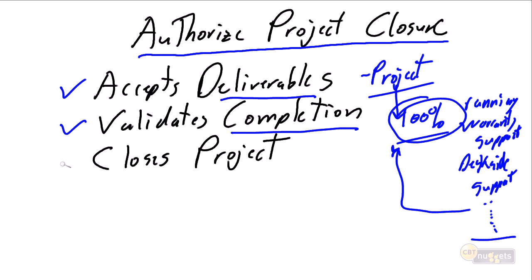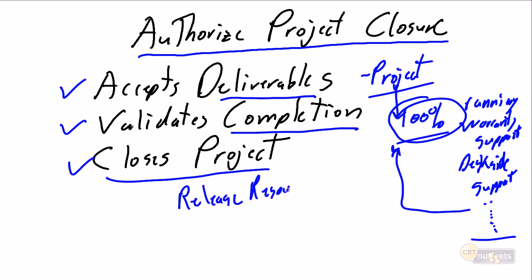Senior management is going to ensure we do our lessons learned, that we harvest our reusable artifacts, that the organization is better off not just for the results of the project, but we're better off from a best practices viewpoint. And then they're going to formally close the project, say this project is now closed, we're going to release the resources, and we're going to make this project team available to work on other sanctioned, approved project or operational activities.